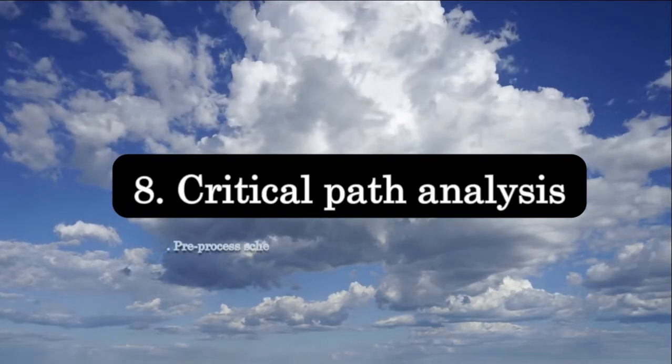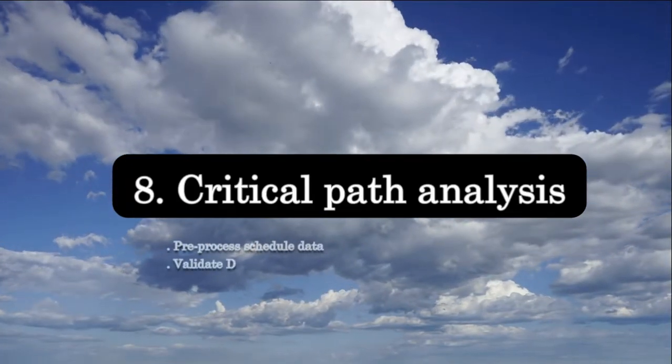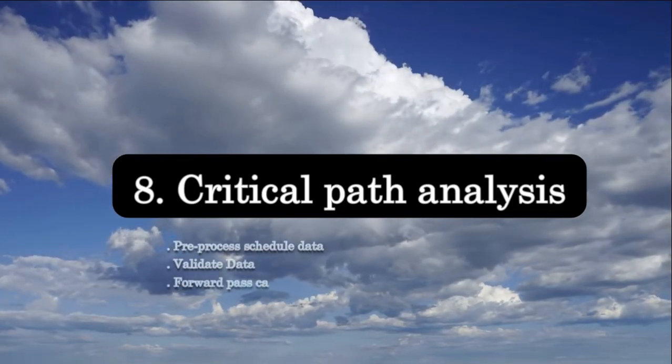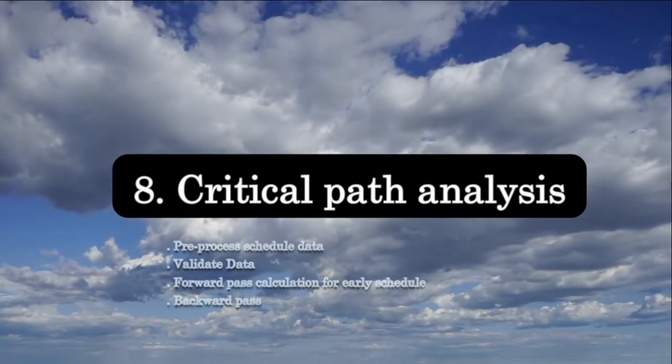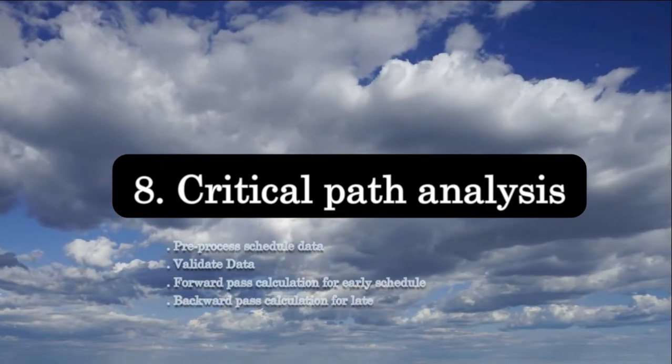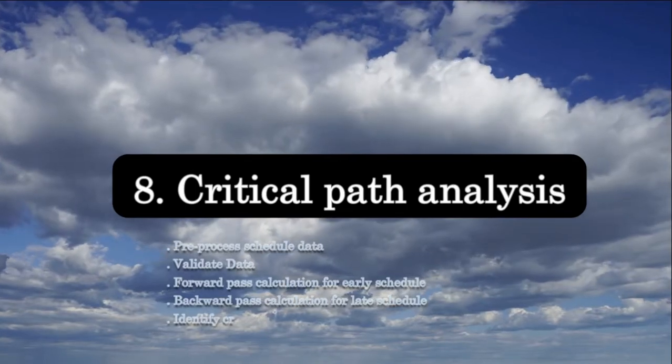Section 8 discusses how to implement critical path analysis. Pre-process schedule data. Validate data. Forward pass calculation for early schedule. Backward pass calculation for late schedule.